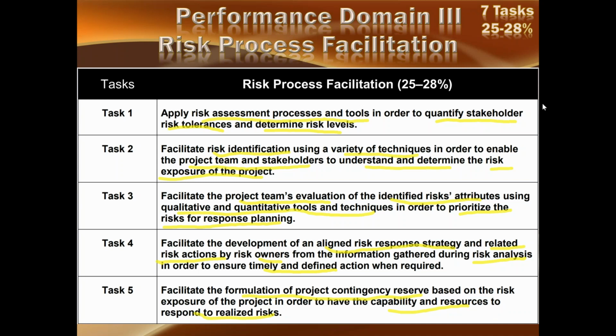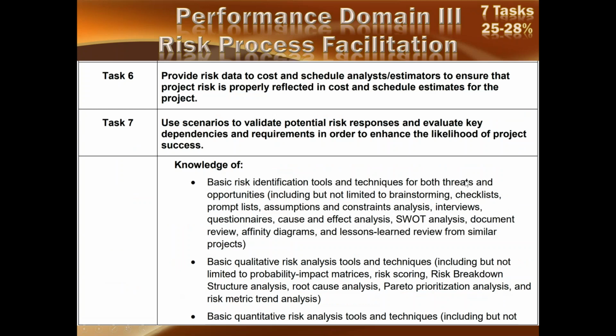So this contingency will take care of the realized risks. Next is task number 6. Provide risk data to cost and schedule analyst estimators to ensure that project risk is properly reflected in cost and schedule estimate for the project.